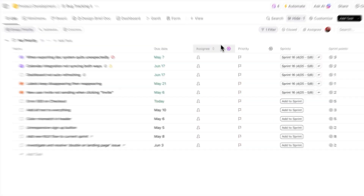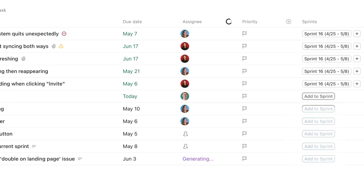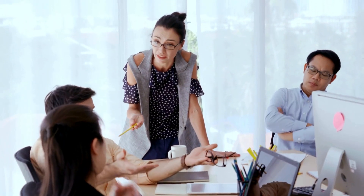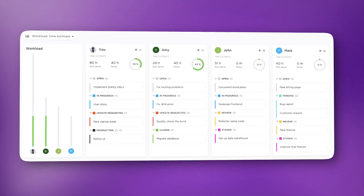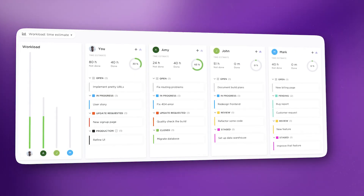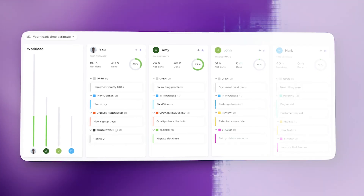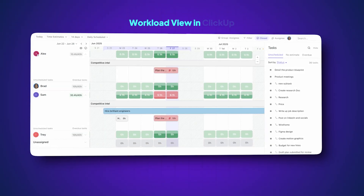Mistake number three: overloading your team. Assigning tasks without checking capacity honestly boggles my mind. Sarah gets buried under 15 tasks due this week while Mike's calendar looks like a ghost town, and then everyone wonders why nothing gets finished on time. Fortunately, there's a simple fix. All you need is a dashboard that shows who has how much on their plate and makes it easy to rebalance — something like ClickUp's workload view.